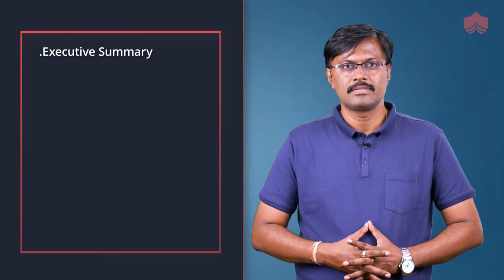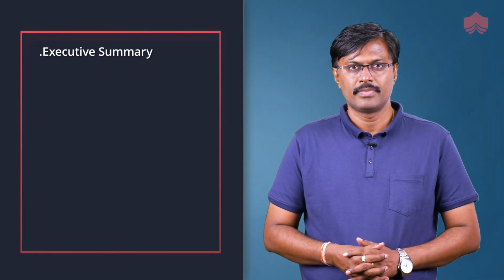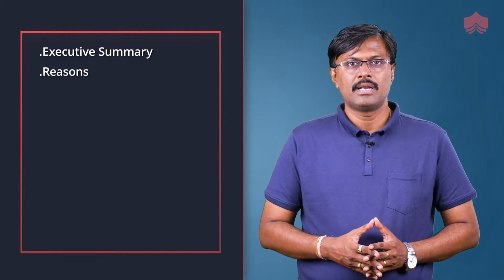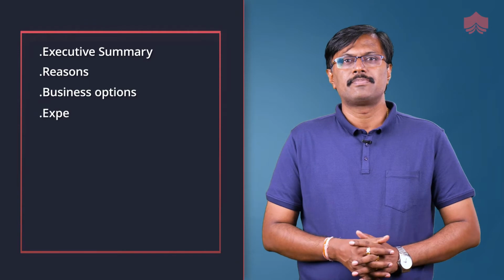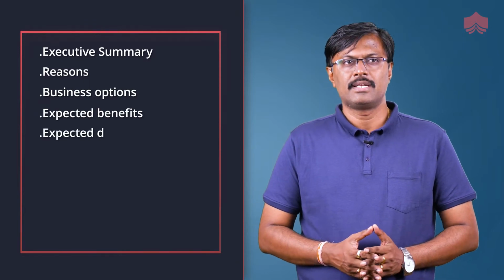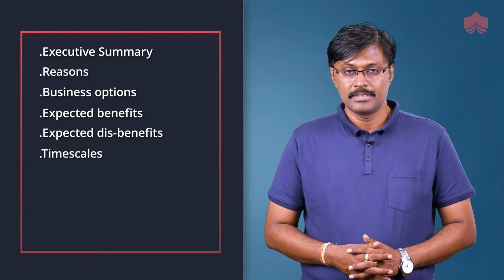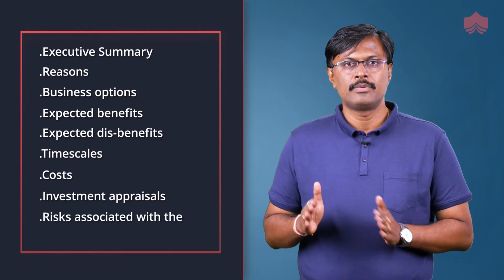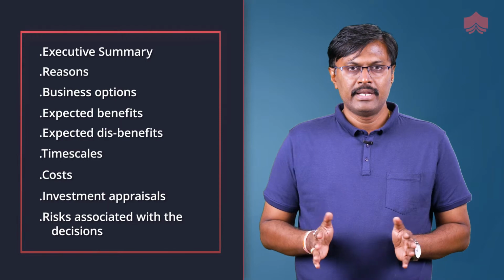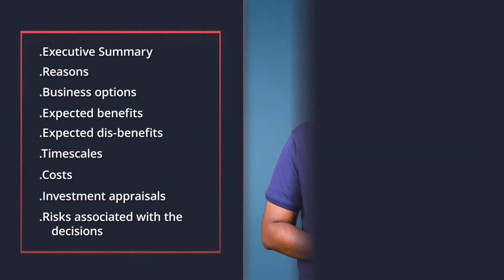Every business case should capture an executive summary related to the case considered based on the scenarios, the reasons for taking up that particular project, business options, expected benefits, expected disbenefits, time scales, costs, investment appraisal, risk associated with the decision, recommendations and conclusion.